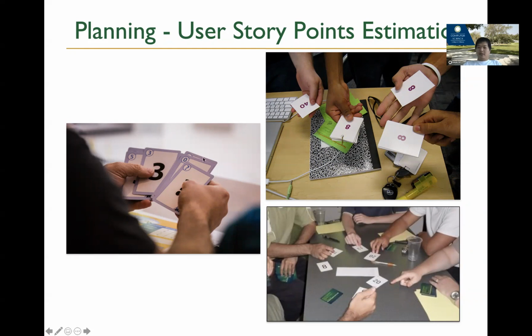The reason this is important is that most of the time you will see the numbers are pretty close, but there might be cases where somebody showed 8 hours and another showed 1 hour, right? That needs some discussion, because maybe the person who showed 1 hour knows a more efficient way to do it, or maybe there's component reuse, or the person who thinks it's 8 hours knows some challenging part that people didn't figure out before. This is a very important step, because it asks everyone to put their opinion and experience on the table, and that guarantees a more accurate estimation.